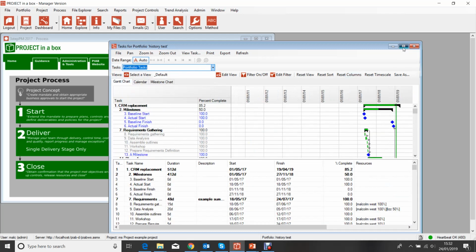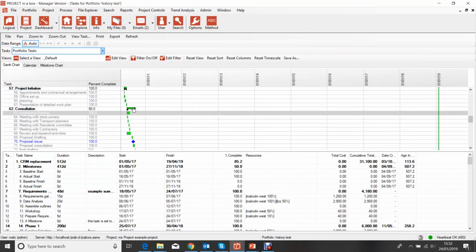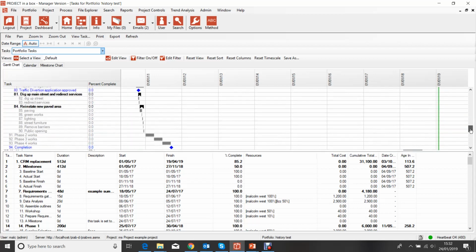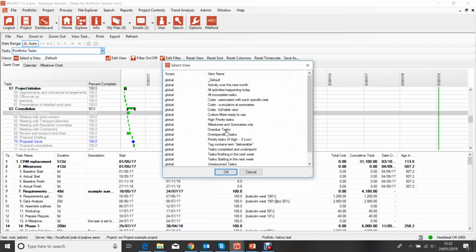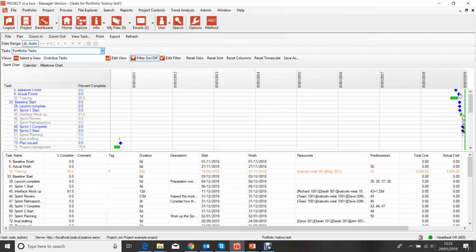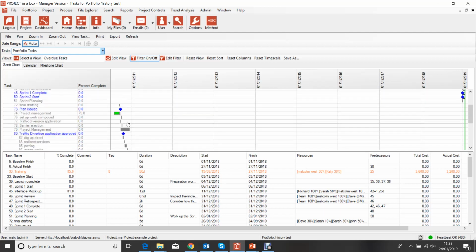So if we go to portfolio tasks, and now we see some of these are planner files, obviously. This is our Microsoft Project example here, and these are the ones. You don't particularly notice that they're any different, and filters will apply to them in the same way. So if we go and do our favoured overdue tasks, we'll see that we're picking up overdue tasks from the Microsoft Project file and from the other planner files. All of those analyses work in the same way based on the fundamental data that they've been given. Of course, if you look for overspending tasks, which is something based on the cost coming through from the plan, you won't find any there because we're not bringing data back on that topic.